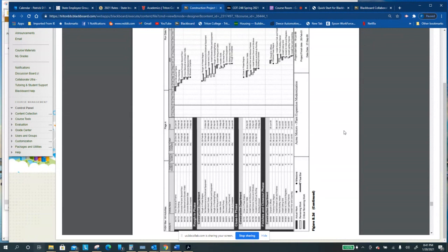I used to do a lot of hospital work, and if they shut down their ORs, each day is so many hundreds of thousands of dollars in hospital revenue that they don't see because they're unable to use those rooms. So in situations like that, they go into the project knowing we have to do this in the fastest way possible. We want to shorten the time frame as much as we can.